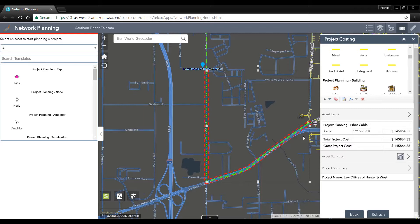This particular tool has buffered the route to create a project boundary, and it has factored in what the total cost would be for an aerial build.